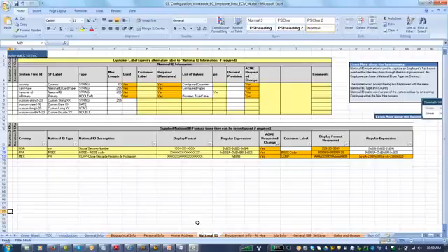Once we get this, we will do the configuration accordingly. The configuration workbook is a very important thing. We need to drive home the point to them to update it on an ongoing basis and take the sign-off. That is very important, and then do the configuration after the sign-off is done. Before that, we should not do anything.